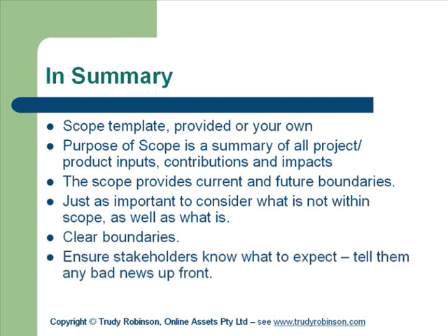Okay. In the scope and any other documents, one of the things I've talked about is actually telling people bad news, because you will have to. So in your scope, the assumptions and the exclusions are often not what they want to hear, but you'll have to tell them. And it's better to do it straight up front, because then they can make the decision before you spend the money and take the time and the energy further down the track to be told something that they don't want to be told. So when we get more into the scope discussions and some of the other risk management and all the rest of its subjects, we will go through this in more detail.